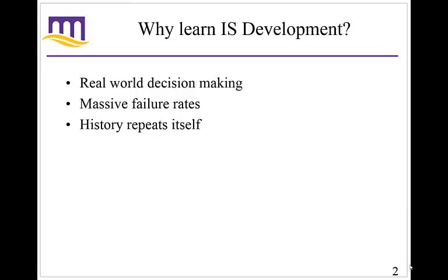HR gets involved and says, well, we could announce new job openings, and then the operations guy says, well, we can communicate with our suppliers doing this, and before you know it, it's just a hodgepodge of ideas all thrown together, and they keep demanding changes. And so this original project, creating a Facebook page, which you can do in about 10 minutes, could end up taking months and months, take twice as long if not more, and take a lot more money than originally planned, right?